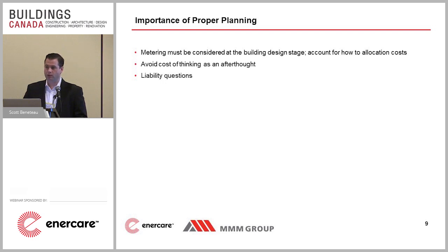So a lot of the problems that you can run into by a lack of planning can be solved up front by working with a credible partner that has experience with this and is providing the design and consultation in the first instance. There's also questions of liability. We do know of some developers who've had very strained relationships with the commercial parties that they've entered into as a result of the sharing formulas for energy many years after the development was done. So by proper planning, design, and deployment of meters, you can avoid that and have a more pleasant experience through all phases of the development.